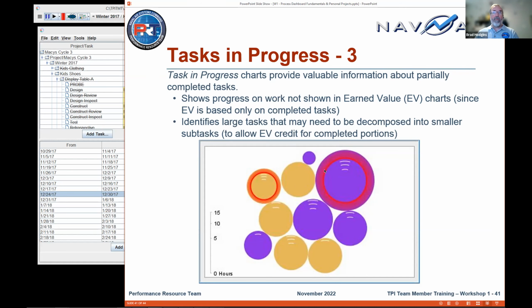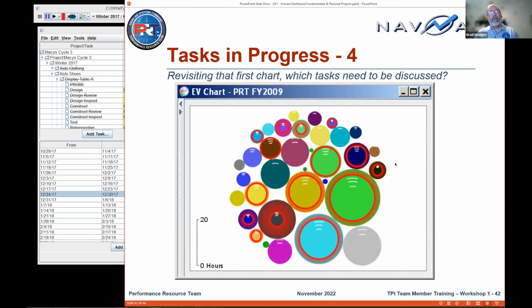Now, go back to the one that we showed in the beginning, that mess. Given that you have the insight, one of the guidance we give the teams is that if anything goes over a week of labor, and like I mentioned, task hours are a fraction of the 40 hours, so let's call it 15 or 20 hours a week, that's your labor for an individual.